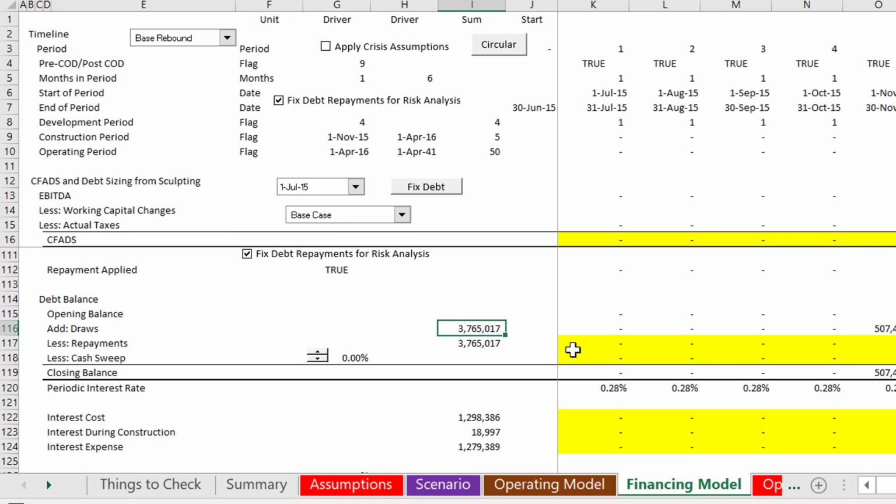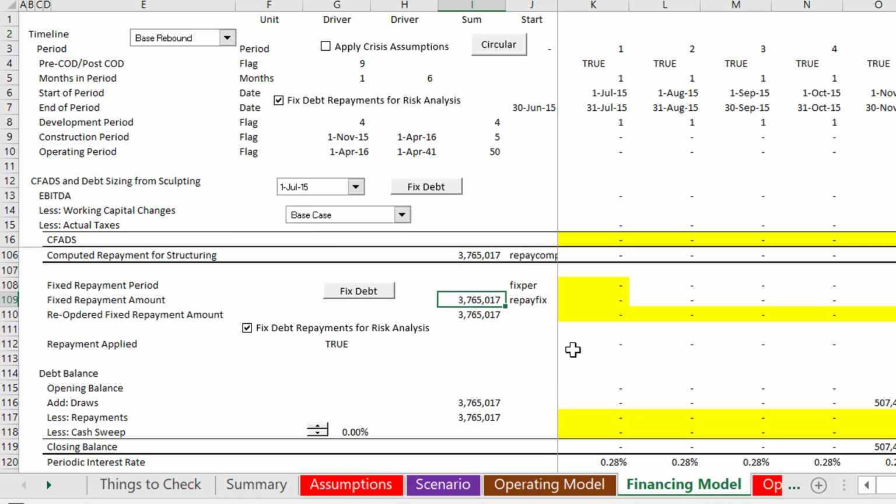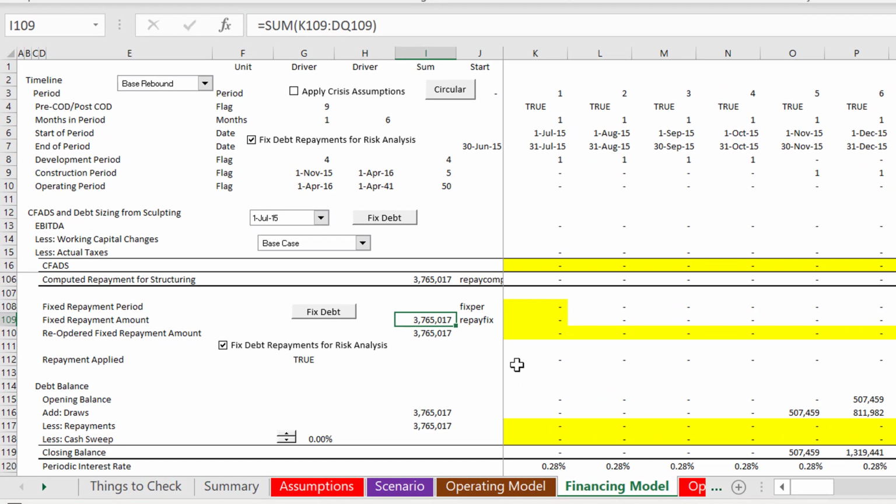And I never put the sum function in. And the repayments, you could put a little bit of checks. The total repayment here better equal this total repayment, and the draws better equal the repayment. And I used to be obsessed with putting my little true falses and thought I was fancy by putting a little audit sheet on all that kind of stuff, that's very standard nowadays.